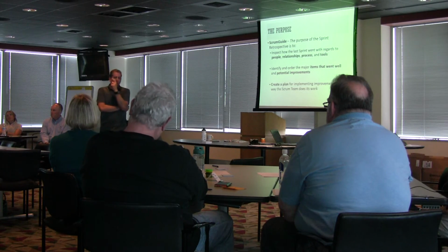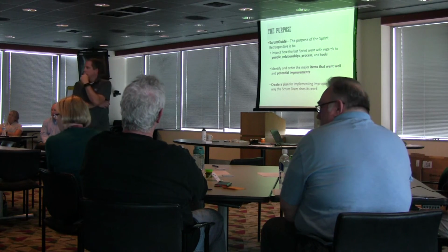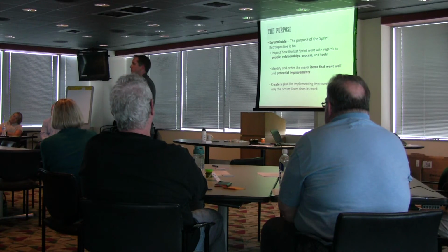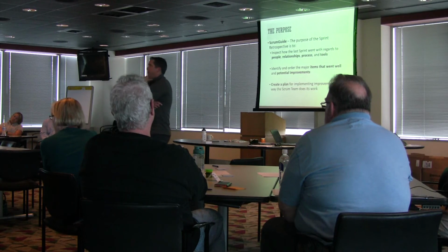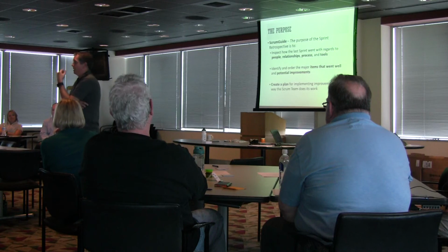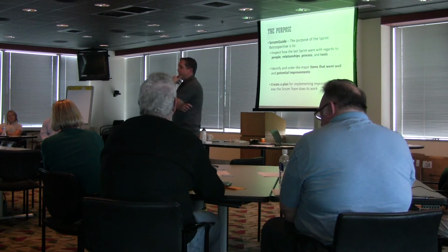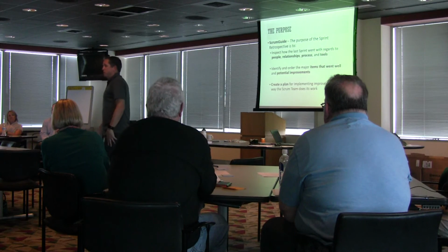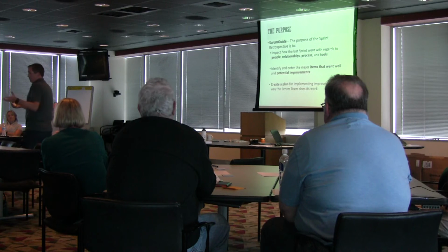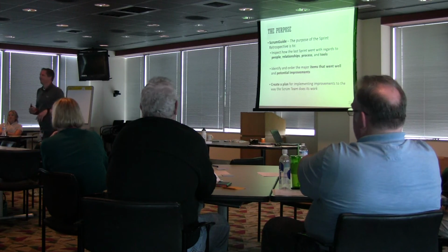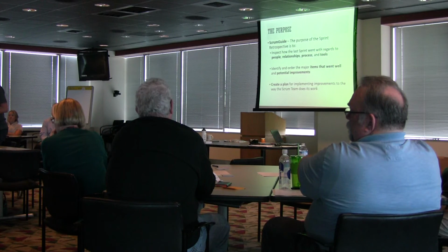So what do you do? To create a plan, do you identify who is responsible for that plan and who is going to hold that person or those people accountable for that plan before you move through? Maybe. I've done that with teams. I've basically given an owner, someone who's most vested in it. I want to be careful about doing that, in the sense that if Chris wrote up on the board, collaboration's a problem, all right, Chris, you own it. Now I've just discouraged that. I think it's a question. I think it's, okay, these are our action items, or these are improvements, or here's what we want to take away. Who wants to be part of that? Yeah. Or who has bandwidth to take action on that?